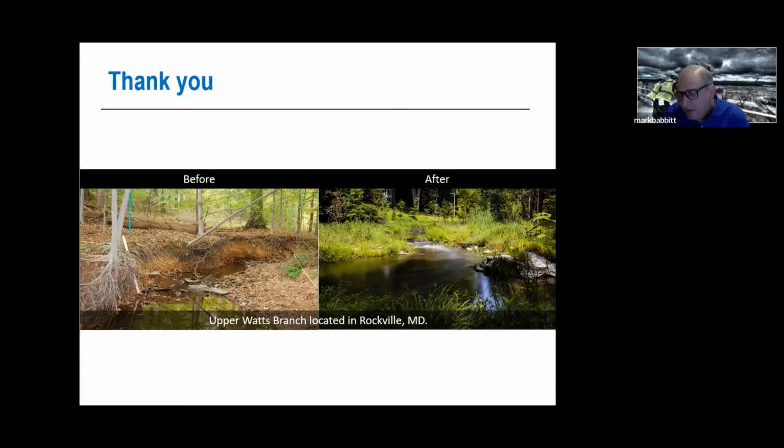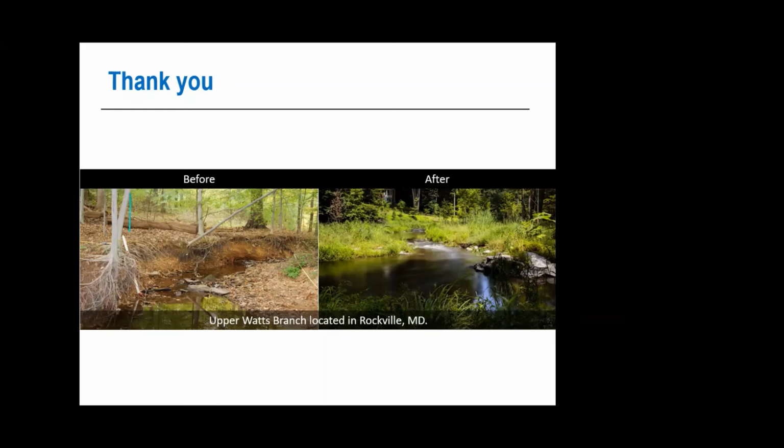They're submitting their pre-construction submittals. We've asked them to reverse from going upstream down to going downstream up. As soon as they evaluate the delivery schedules, the ability to obtain the material, and the ability to clear the trees and get through that, we will have that. As you know, we've had some issues with the trees. So as soon as that's cleared, they will know their schedule and we will share it with anyone who wants it. Thank you very much.